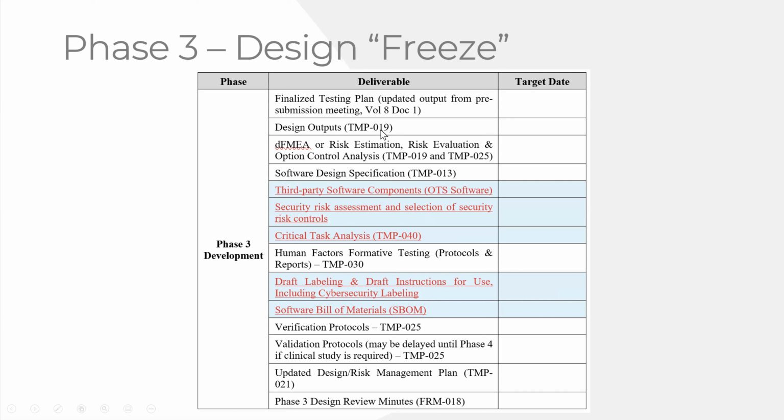That's your drawings and specifications. We have your risk analysis. We have your software design spec. We have all your verification protocols and validation protocols before you actually do them. Yes, they're supposed to be reviewed and approved prospectively before you actually conduct them, not afterwards, and then you adjust the protocol to match the results. That's not how it works. The FDA actually checks the dates, to make sure you approved it before you actually conducted it.